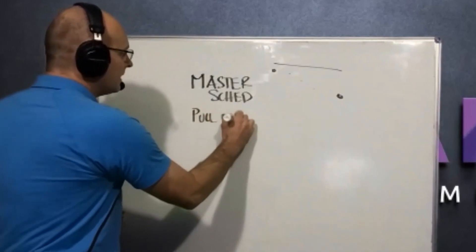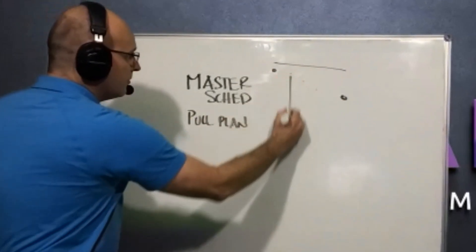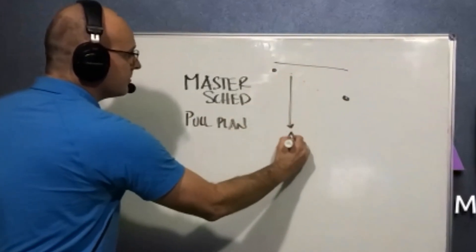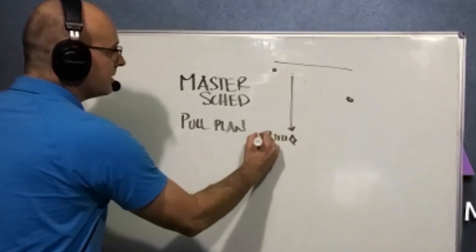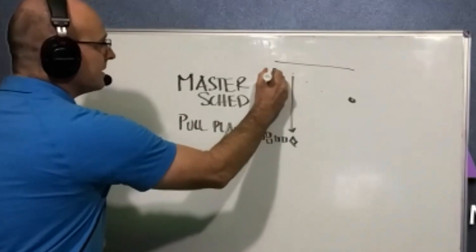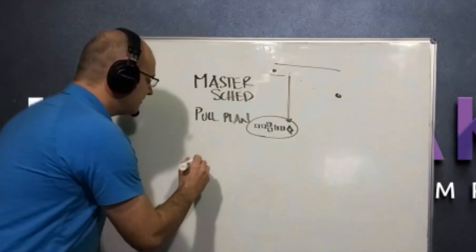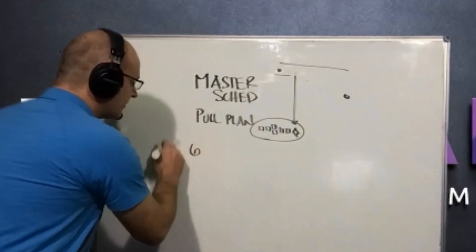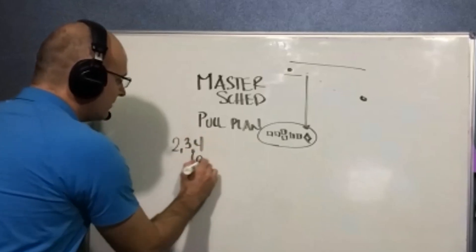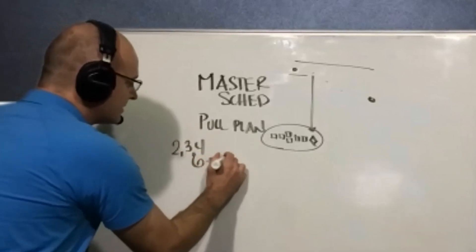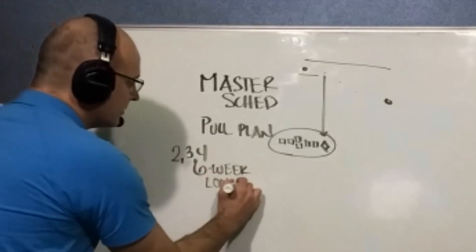After that, you're always going to have your pull plan. That's where, whether you're using CPM or TACT, you vertically align that milestone and then pull plan the sequence — usually backwards, but it can be done forward — and you confirm that sequence with your trade partners. Then you come down and you have a six-week make-ready look-ahead schedule.